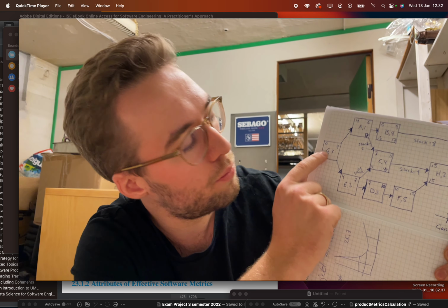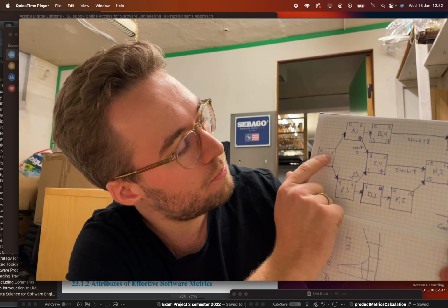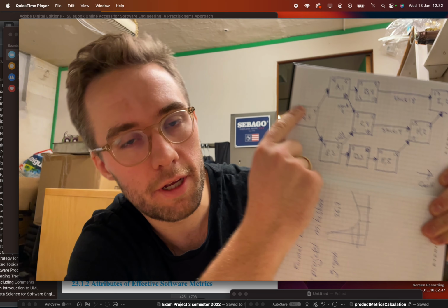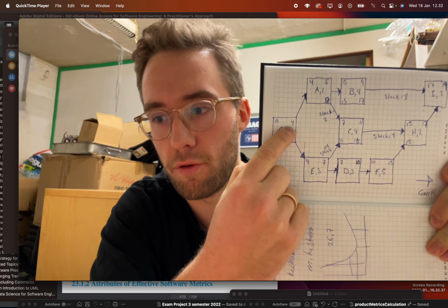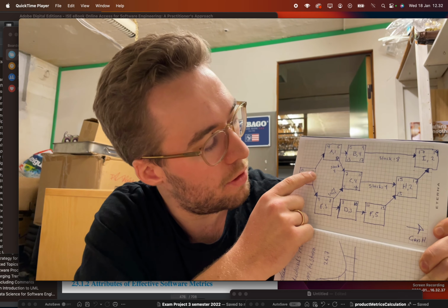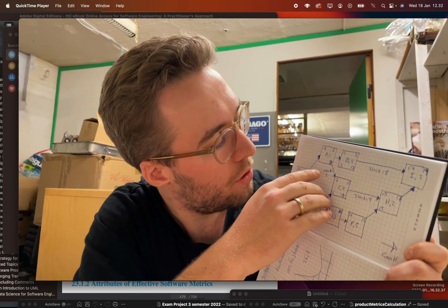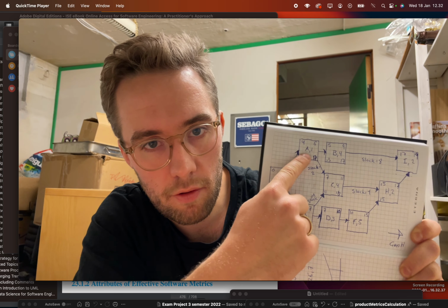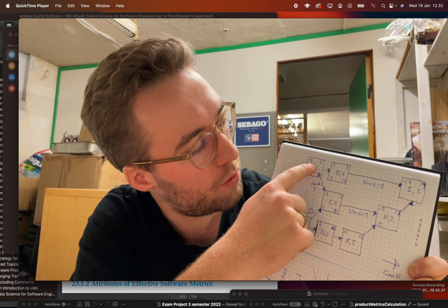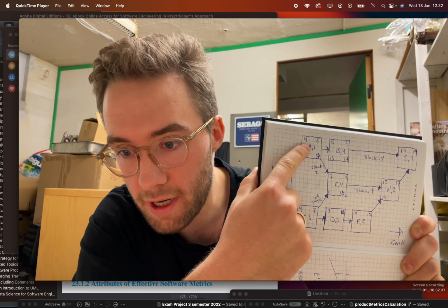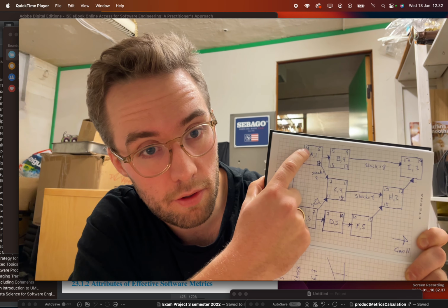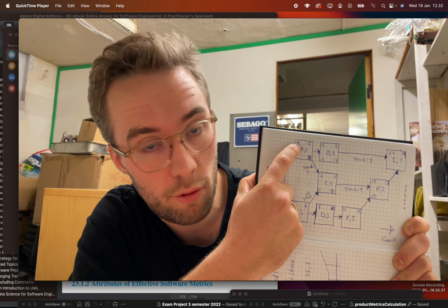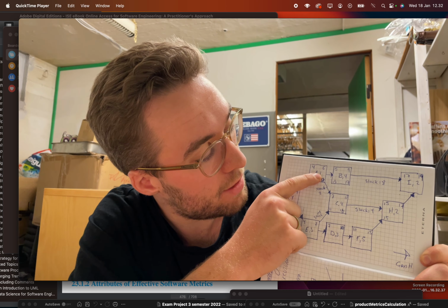So you say, okay, we have the G, it's 4 hours. So we put here where we start, and this is where we finish. After 4 hours we're done with this task, or 4 units. And then our next one is A. So A will start here, at the first possible count it can start. So it starts at 4, and then it lasts.